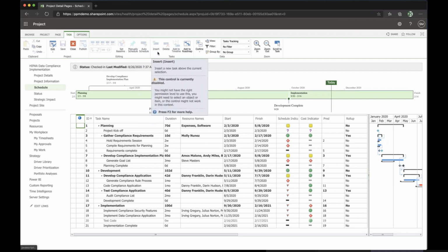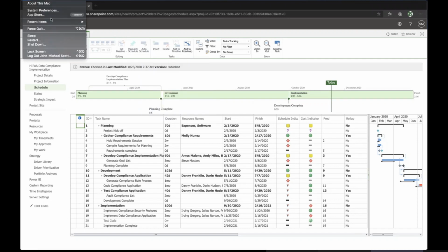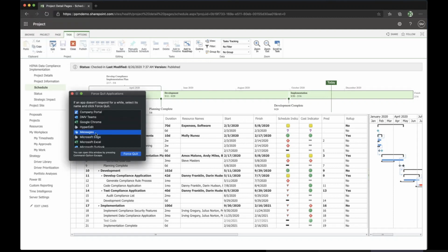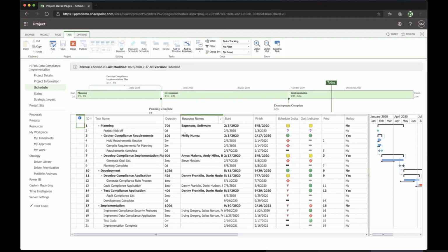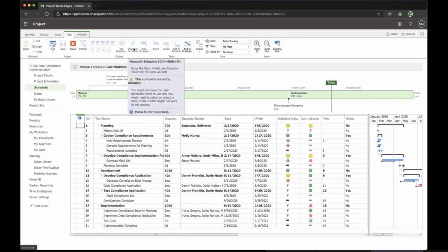And most of the time, we don't really want people actually using manual scheduling, largely because manual scheduling is going to take away our ability to see those changes to the baseline. It's going to take away our ability to see how the project evolves over time. So although it's possible, it's used mostly by individuals who are managing their own projects without working inside of a greater organization.